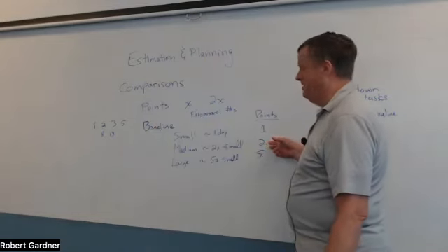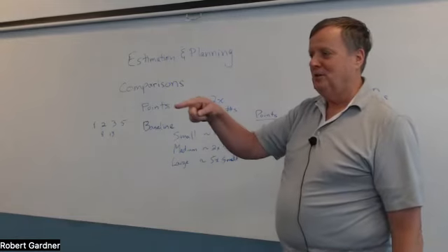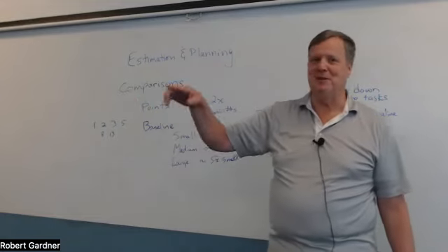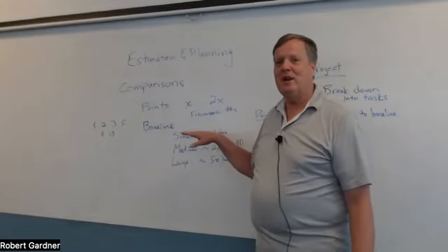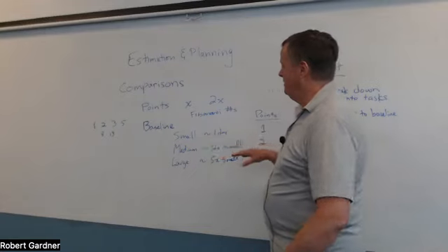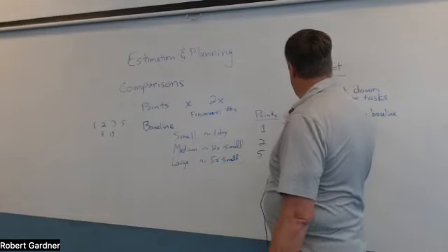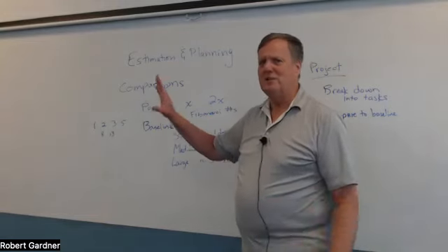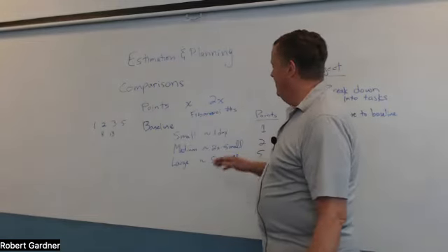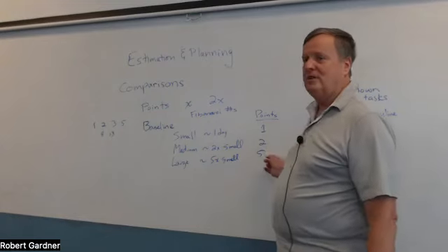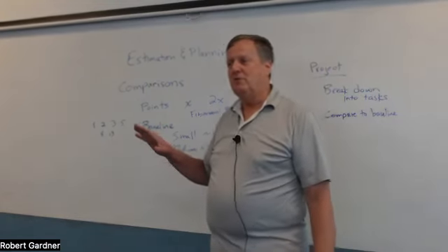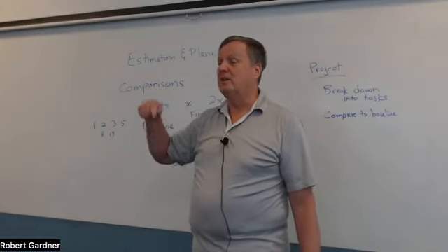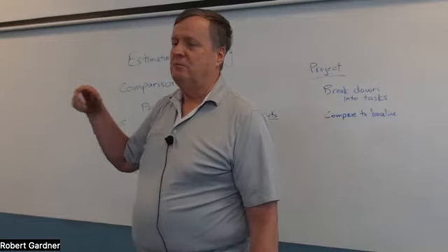See how long it takes you to do a 3-point task? You might be the person who's 20 times faster than another, or ten different people. You track the team. So usually when you're starting out, you'll pull a number of tasks off your task list and say, we think we can get this much done in one sprint. And they add up to 35 points. So we think we can get 35 points done in a sprint. Then at the end of the sprint, you look and see how many you really got done. And maybe it was only 20.